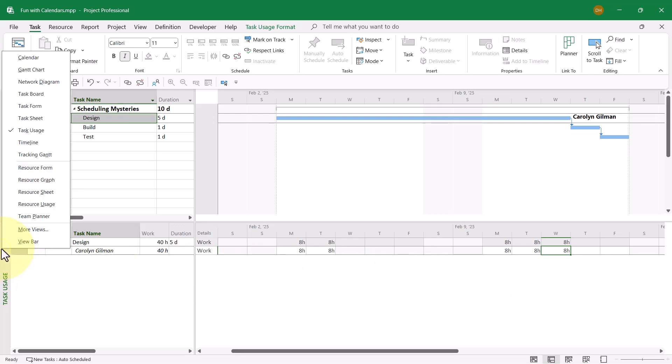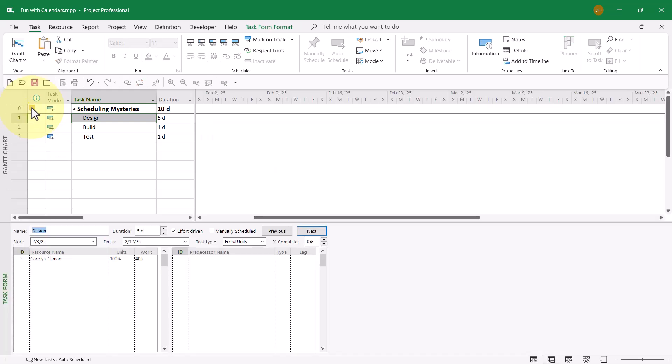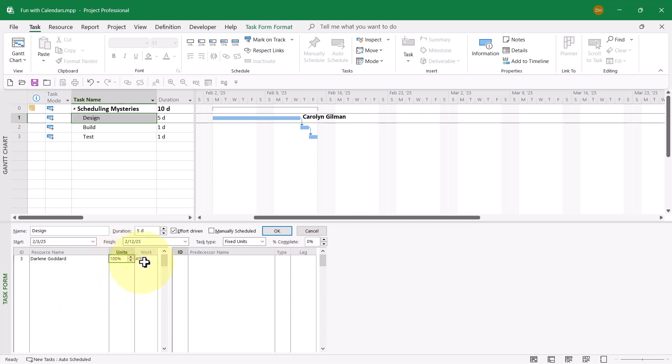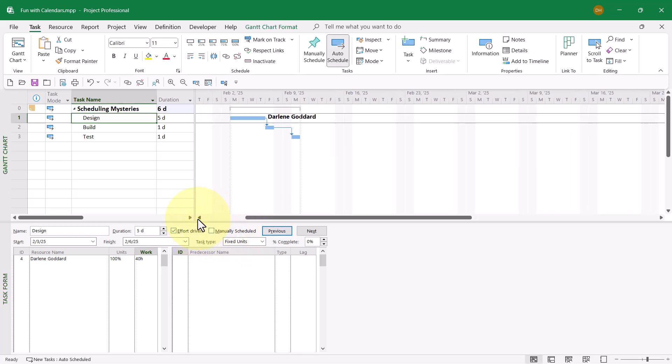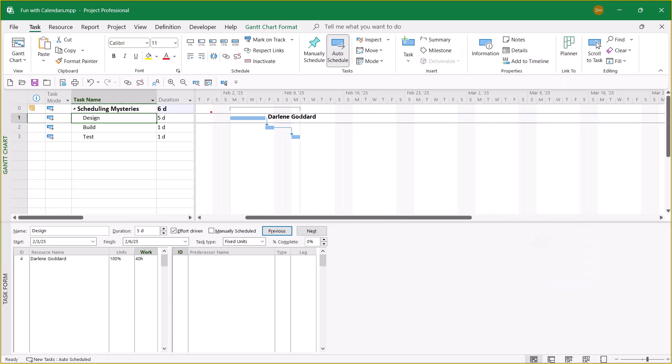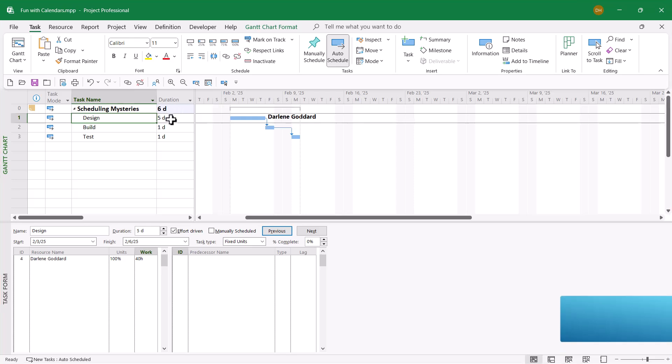Let's go back to the task form view. I don't think Carolyn is going to work out for this task, so why don't we try Darlene Goddard? We'll have her work full-time for 40 hours. That should continue with the duration of five days. When I click the OK button, holy moly, now we've got an even weirder scheduling issue. Notice the time span for the task now is only four days, except the duration is still five days. This is even weirder than before.